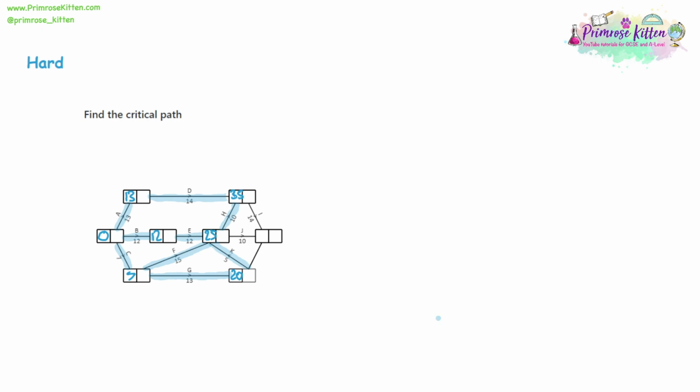Then we can add on 14 to 35, which will give us 49. Adding on 10 to 25 gives 35. That's smaller, so our diagram is complete. So now work backwards through it. We'll start with 49. We can take away 14 from 49, which will give us 35.